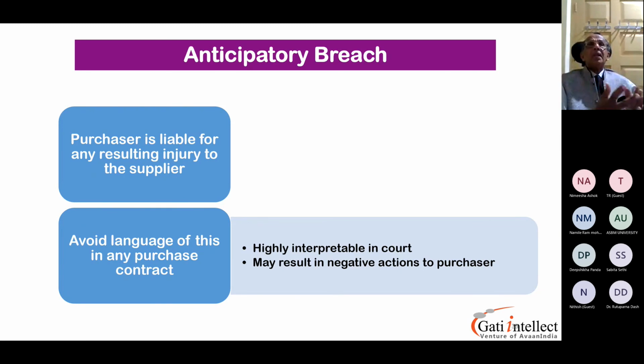You have stipulated these conditions as per the purchase order, and what you have supplied is totally against what is mentioned in the sales contract. Hence you are putting a claim against the supplier for a very large sum, including loss of opportunities. Not only opportunities: if you have to place another order and get it, there is a cost for that as well. Got it?